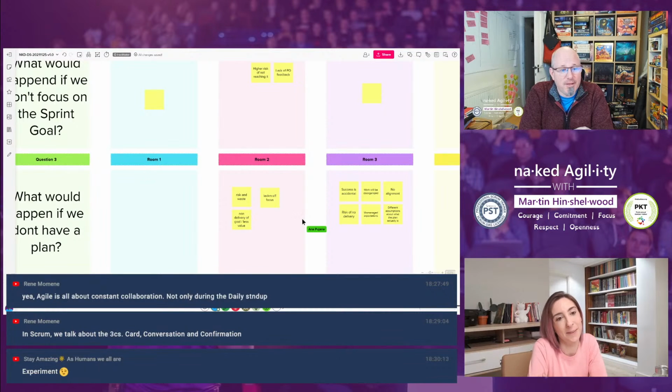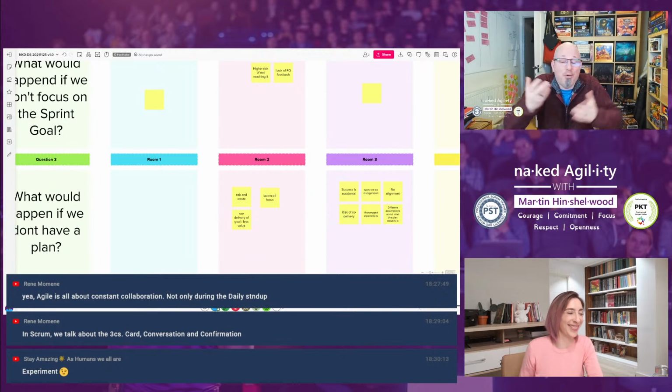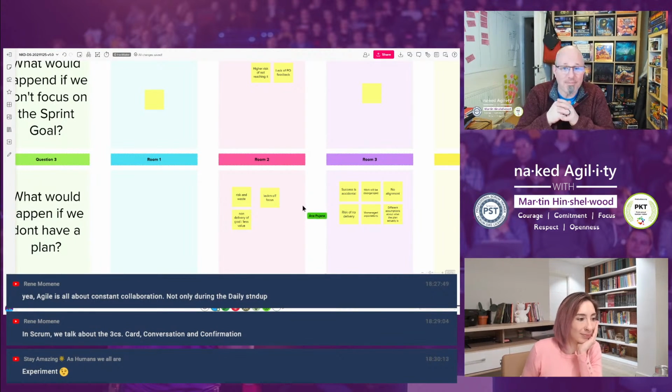Their predictability is low, but it can often be that they don't have a goal, so success then becomes accidental. Why do we fail so many sprints? Because your goal is to complete these 12. So you might make it, you might not, and it will be random chance on whether you do or you don't. How do the dice roll this sprint?